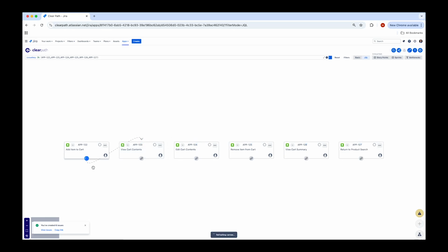So I'll start creating the blocking relationships graphically. Left click and hold on one of the link handles, drag and release on the handle of another ticket. Here you'll see I have one ticket blocking another one. I continue by creating the other relationships.